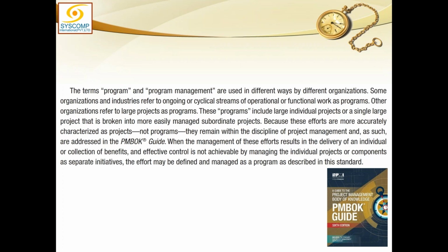Project manager is no more responsible whether somebody starts running this school or not. But I am responsible for handing this school over to the requisite authorities or the operations or whomsoever is going to run the school. So now it becomes their responsibility to reap the benefit out of it. So the benefit realization may start after the close of the project, maybe a couple of years down the road. Do you understand me?